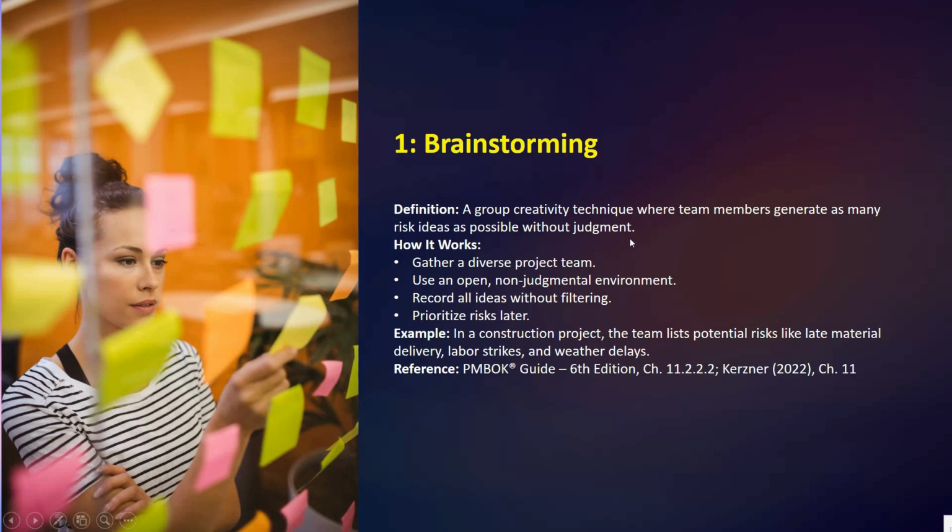Here we have the definition: a group creativity technique where team members generate as many risk ideas as possible without judgment. How it works: gather a diverse project team, use an open, non-judgmental environment, record all ideas without filtering, then prioritize risks later. Using the brainstorming technique, the facilitator guides the group, encouraging every member to contribute any idea that comes to mind.